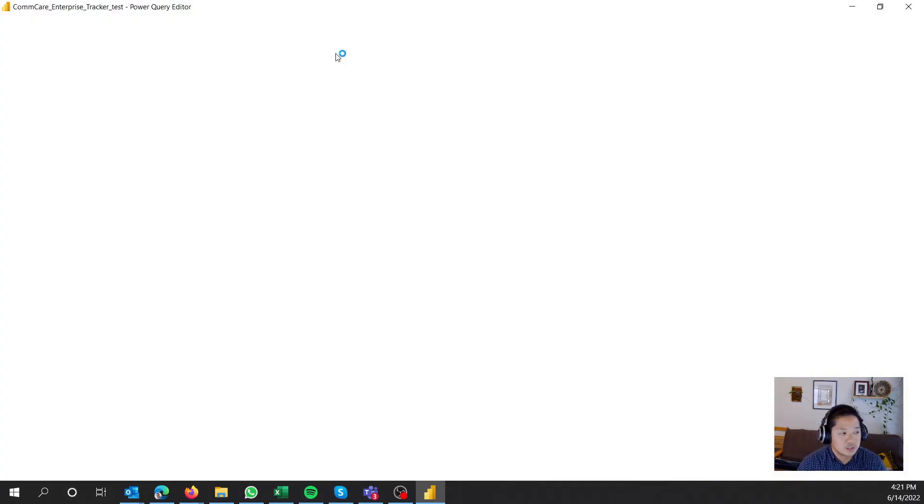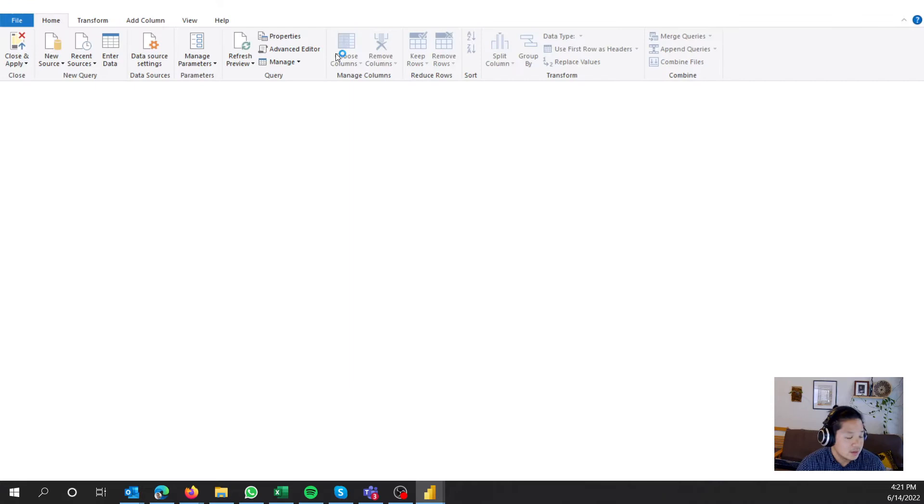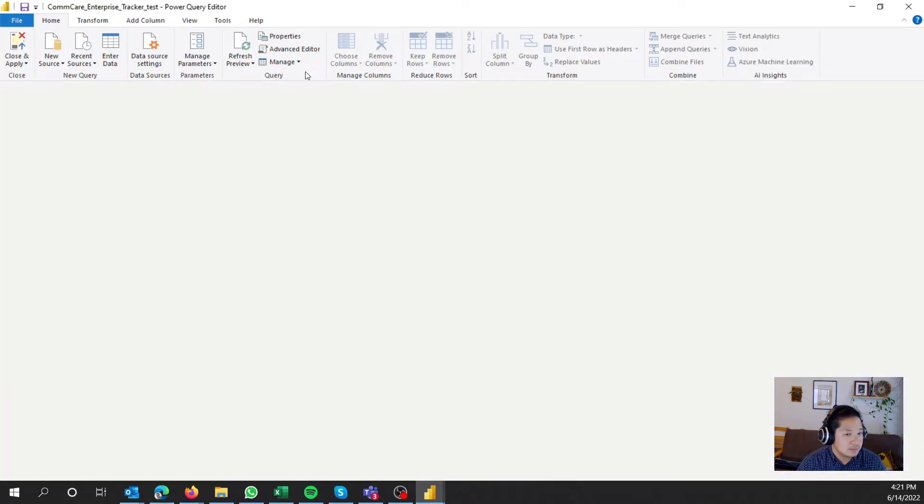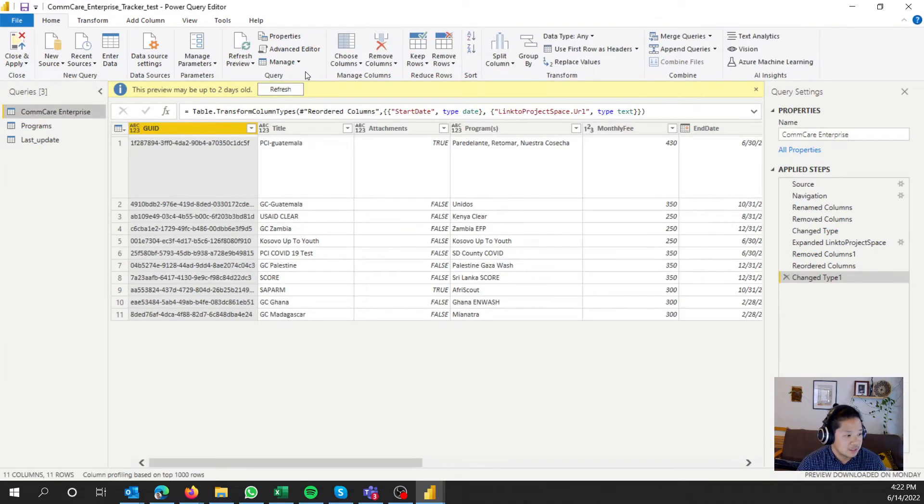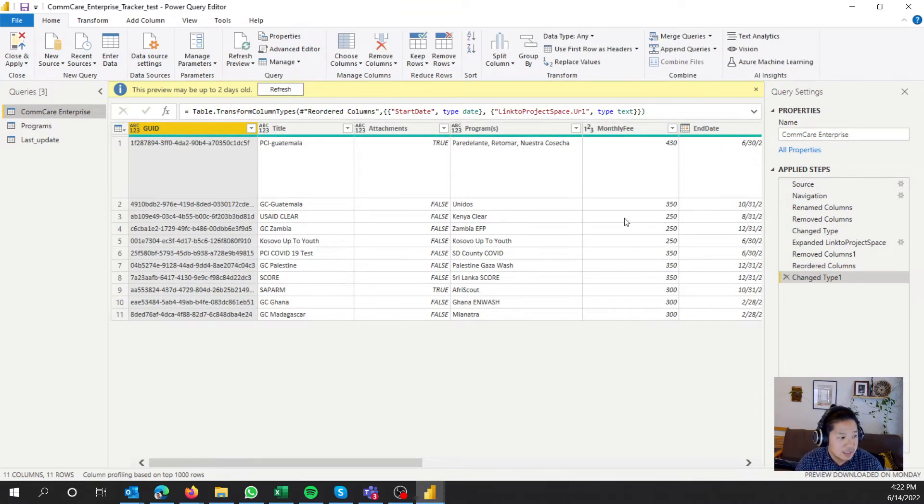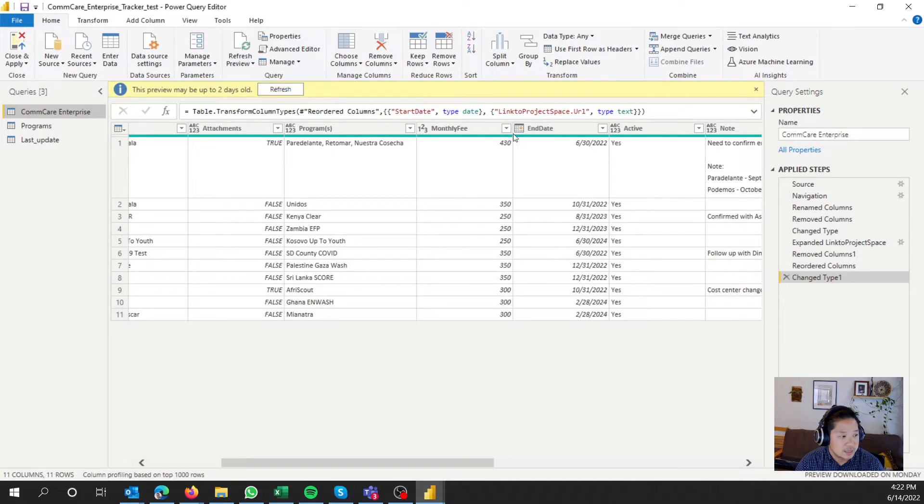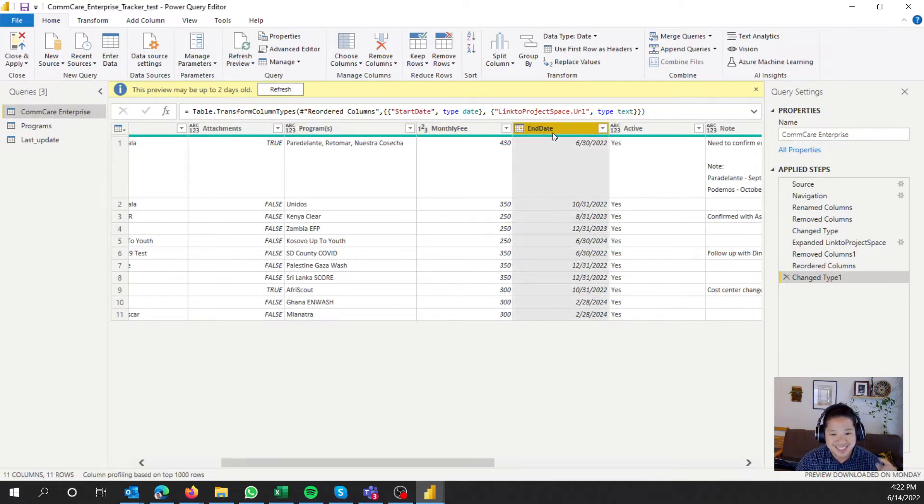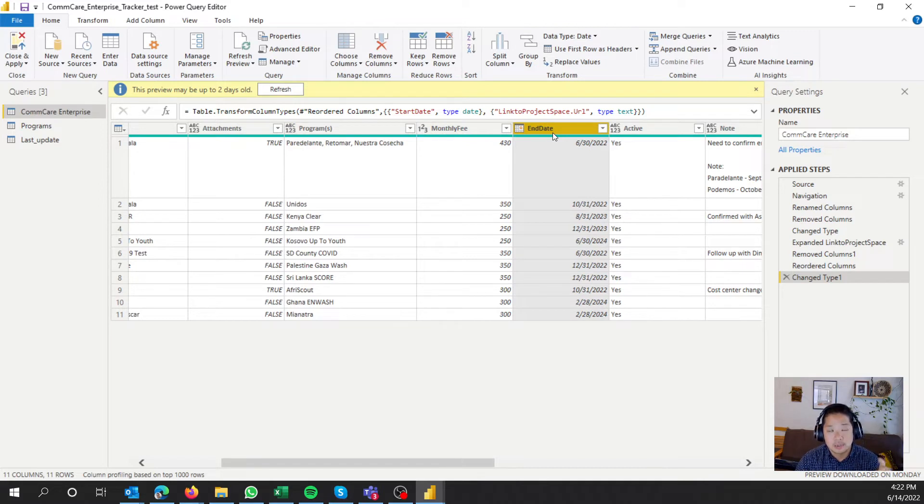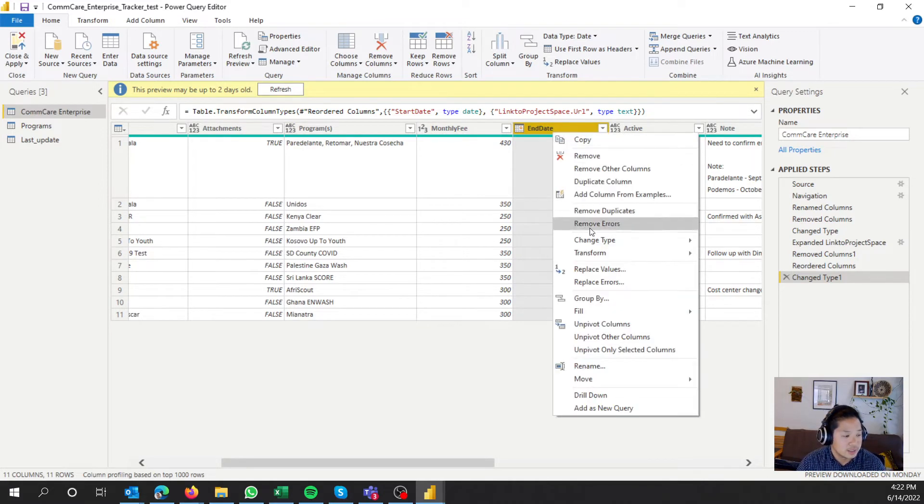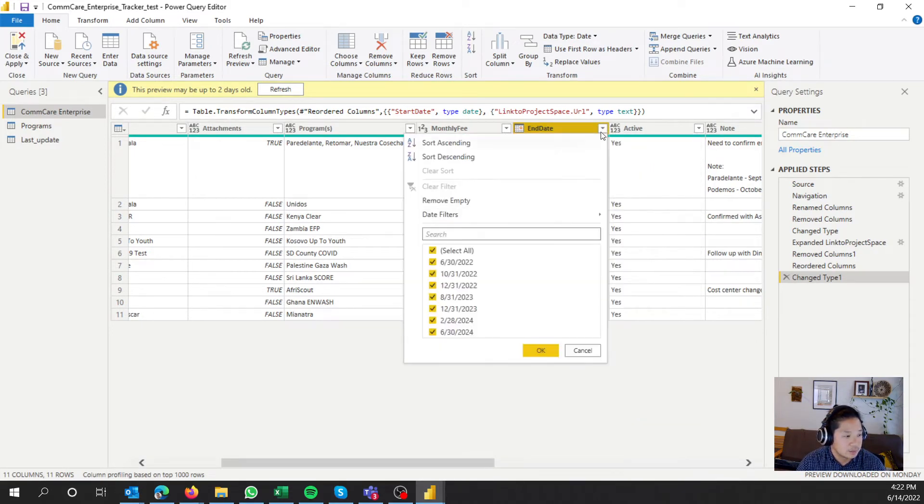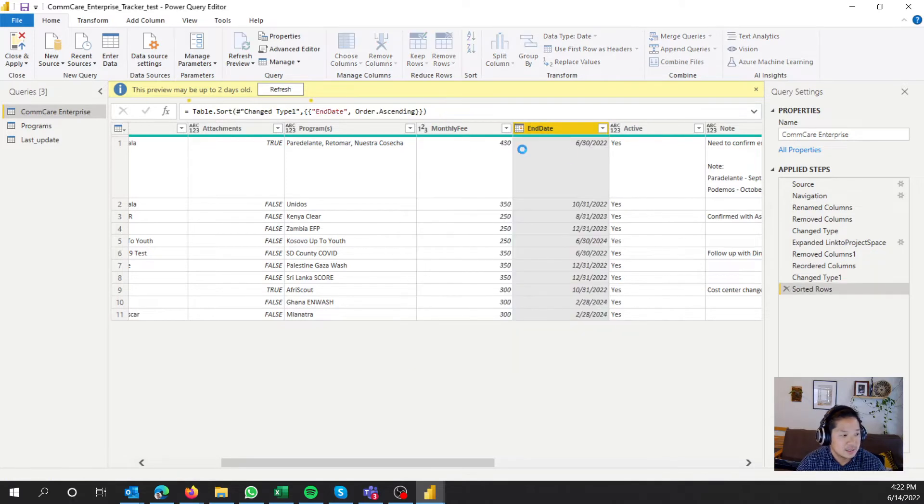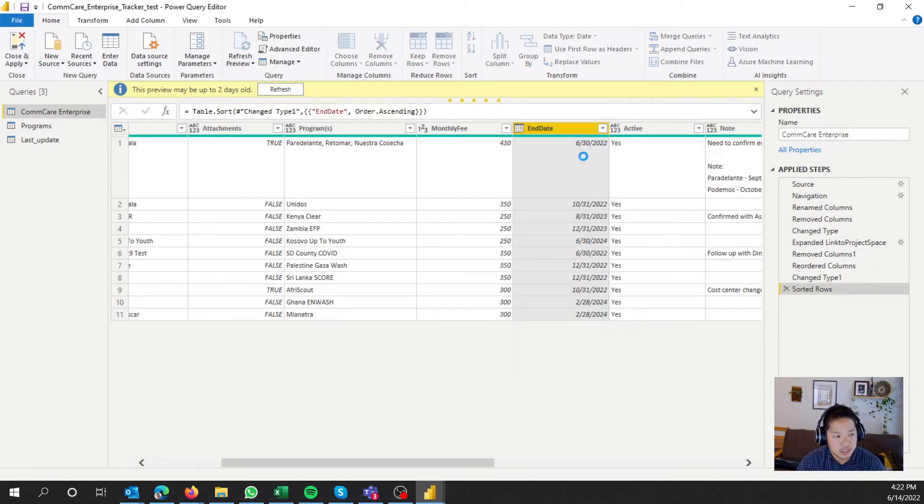So go ahead and transform data. And we're going to get this here. You see all the steps I've taken in here. I've already changed things to date, so I can go ahead, since I've already transformed this into a date, the end date, since this is the field we're going to use to sort it. So we're going to sort ascending. And then you should see it go chronologically.